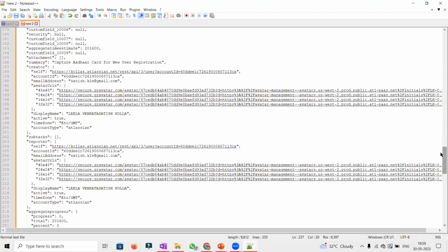So the description field basically will not allow you to create the templates. Rather, we have created a custom field called the detailed description, and in that detailed description field, we have created the templates. Yes, so we are also doing the similar thing. We created a custom field called bug template, and within that, all the required parameters are being added: the bug description, the environment found, something like that. A specific team has specific parameters which they want all the team members to track or log whenever a new bug is created.